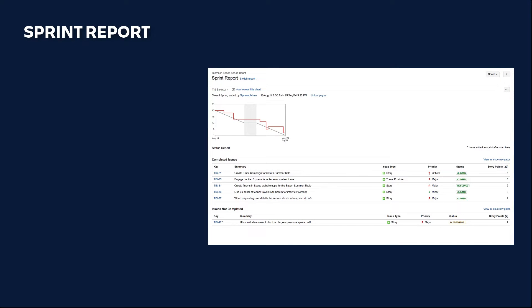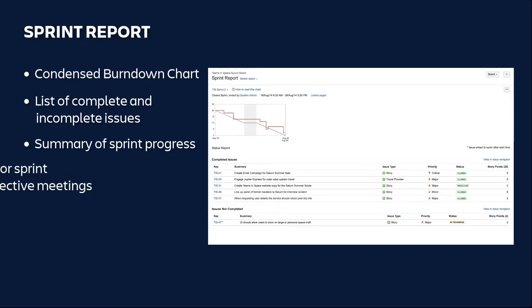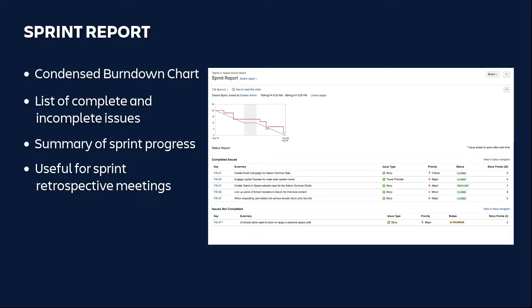The Sprint Report displays a condensed burndown chart along with a list of complete and incomplete issues, providing you with a summary of Sprint progress to date. The Sprint Report is useful for Sprint retrospective meetings and also for mid-Sprint progress checks. Be aware that the Sprint Report only applies to scrum boards.